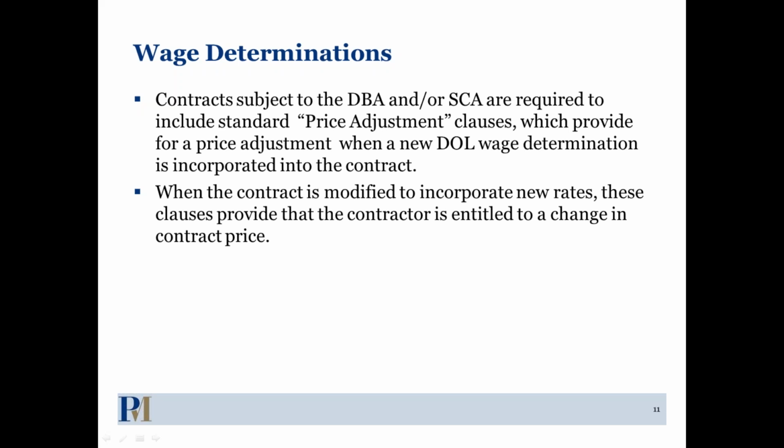I was just going to add that it's not just a best practice. There can be really, and we'll discuss this in a little bit, there can be really bad consequences to paying more than what the contract requires, because it really impedes your ability to get a price adjustment. So you on your own deciding, I want to pay my employees this additional 50 cents, $2, you're not necessarily going to be reimbursed if you do that voluntarily without it being in the contract.